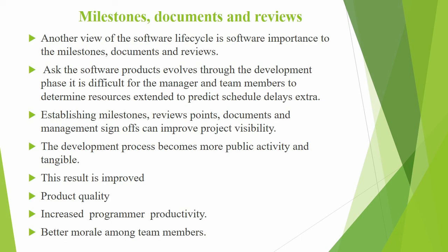The last topic is milestones, documents, and reviews. Another view of the software lifecycle is in terms of milestones, documents, and reviews. As the software product evolves through the development phases, it is difficult for the manager and team members to determine resources expended and to predict schedule delays. Establishing milestones, review points, documents, and management sign-offs can improve project visibility. The development process becomes a more public activity and tangible. The result is improved product quality, increased programmer productivity, and better morale among team members.